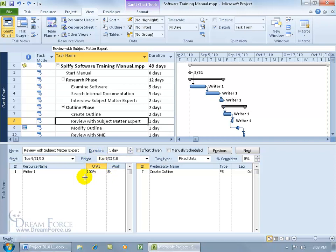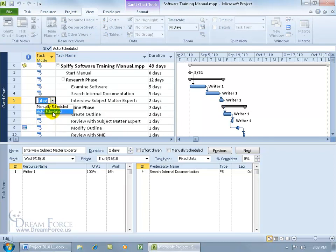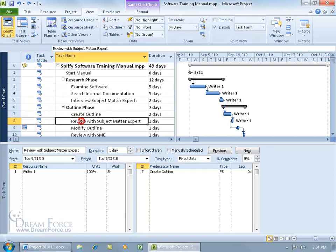For example, reducing the units because maybe Rider 1 can't work 8-hour days but is only available for 4-hour work days. To change this, you can either do it manually by checking manually scheduled — which by default should be checked unless you changed the task mode from manually scheduled to auto scheduled. In the task mode column you can change it from manually to auto. I want to show you that when you change one of these three time fields, how it affects the other time fields. When you change the duration, it will affect one of the other two time fields in the formula — the units or the work.